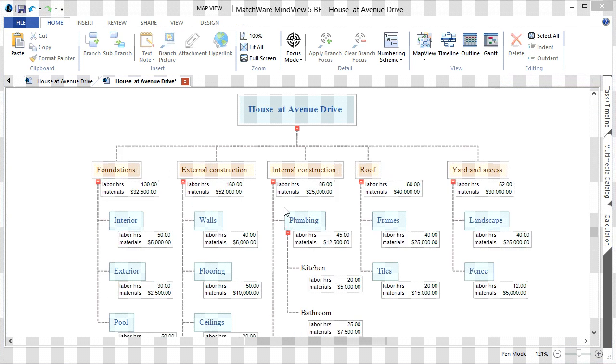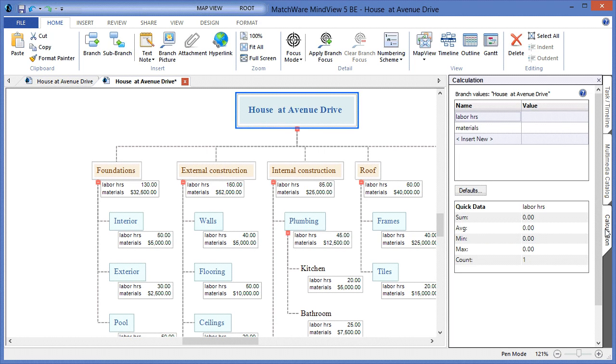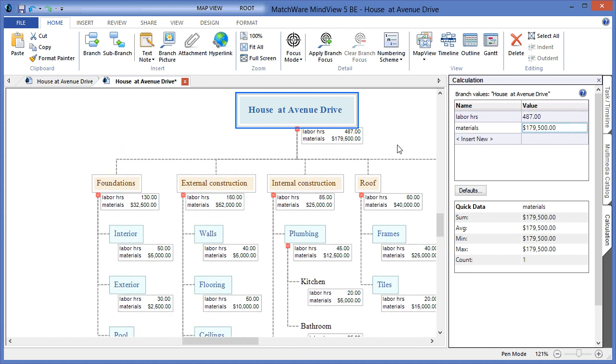An advantage of using the MindView Work Breakdown Structure software is that we continue these running totals from the tasks to the deliverables, and even have the same functionality on the main parent branch or root, which gives me the ability to total the entire map up and give me a global overview of both labor hours and materials for the construction of the house at Avenue Drive.